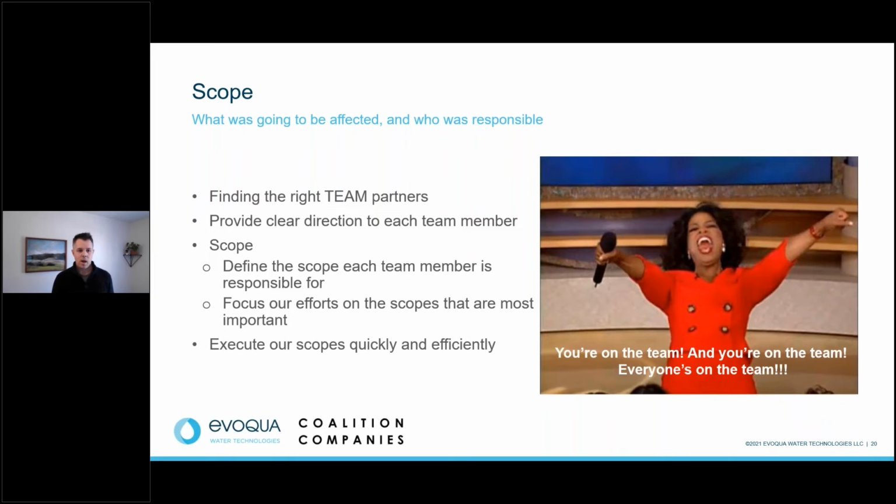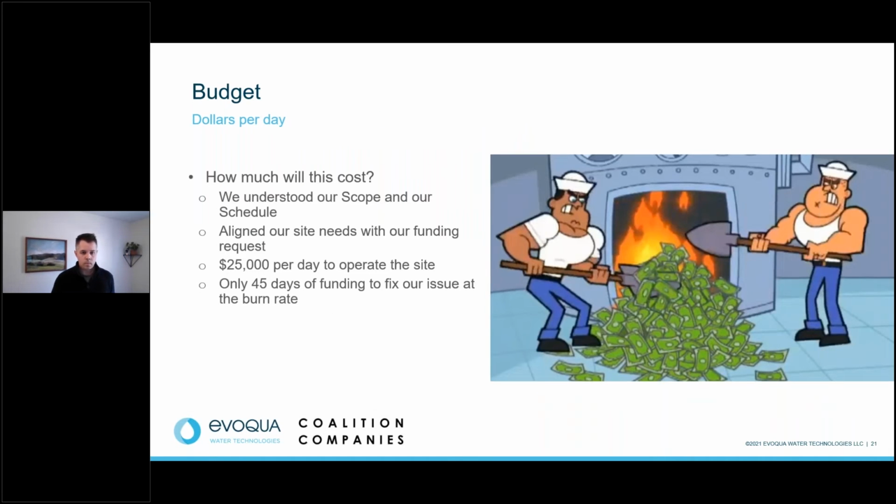in and designed the system for us, having teams like EGLE, the EPA, who worked really closely with us, we actually went through the entire grant process in just under 3 weeks. So from the time that we applied to the time we received $1 million in funding, it was dream scenario, stars aligned, and it was crazy, right? That does not happen in governments the way that I'd like to see it happen. It was just, it blows me away still. So everybody planned and executed really efficiently.